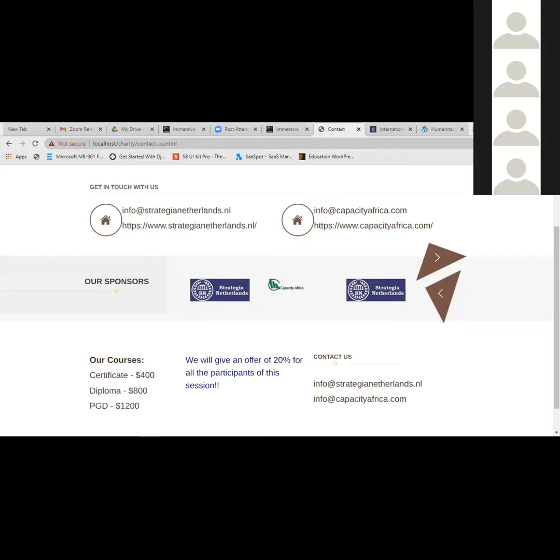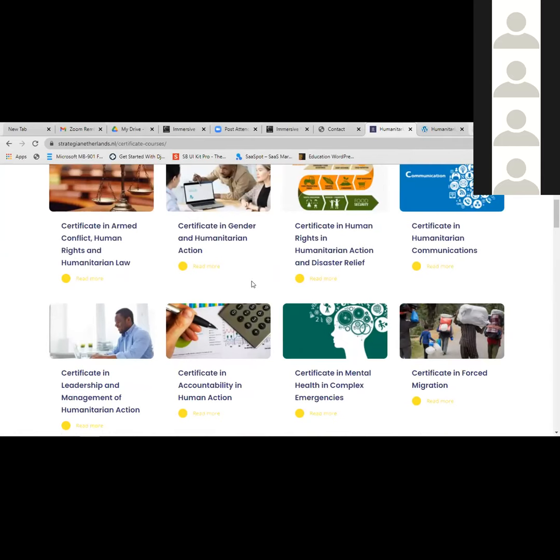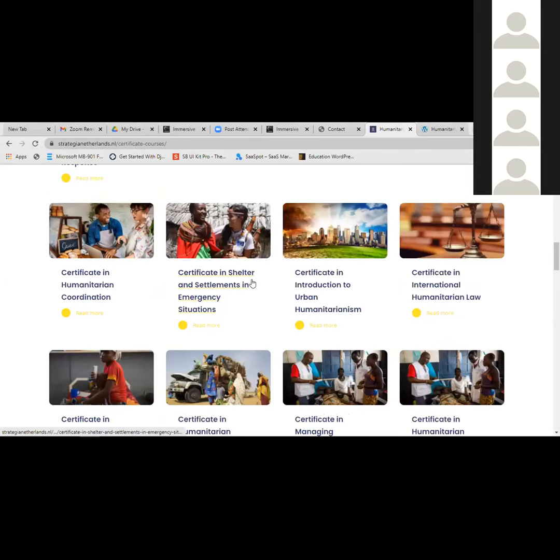And when it comes to the main steps, I think we have said grant management is normally handled in two ways. Either you go the route of proactive grant application, or you go the direction of reactive grant proposal writing. Proactive basically means you search for funding organizations that can actually fund you, you try to establish whether you can make contact with them, you try to get some meetings with them, and you try to see whether you can submit some unsolicited proposals to them.